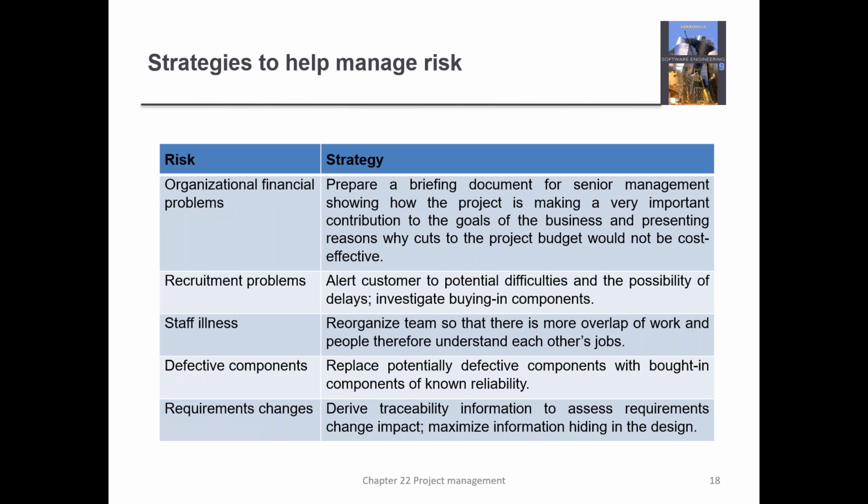But if you're having problems, it is never wise to hide it from your client. You let them know what is happening. So you alert the customer to potential difficulties and the possibility of delays, and investigate buying in components.